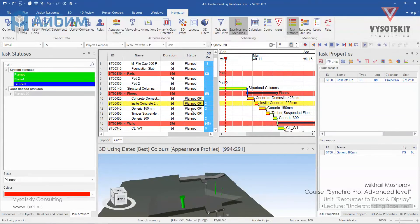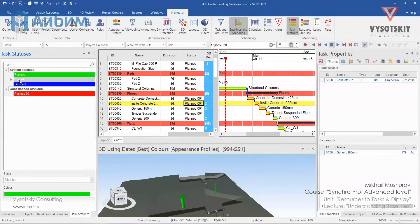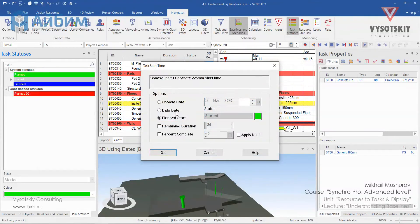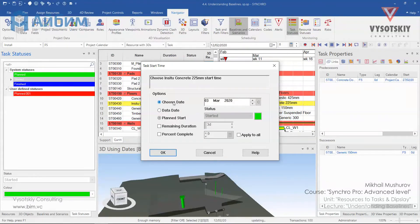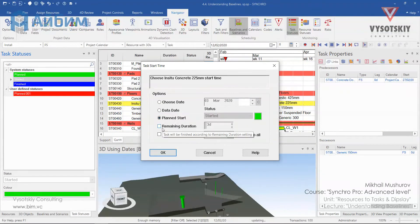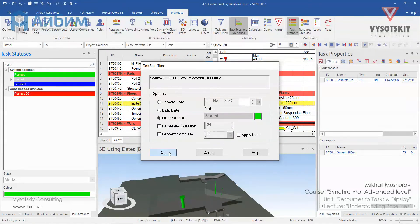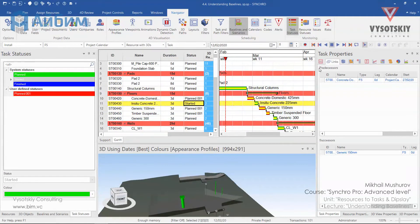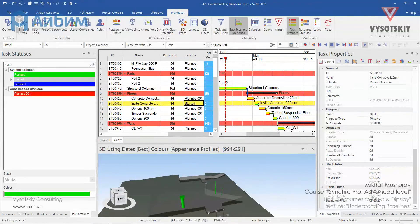Although if you change task status from planned to started or finished, Synchro will ask you to choose actual start date. For example, let's try to assign started to this task. And you see in the dialog Synchro asks us to choose a date manually from the calendar. It can be taken from the project's current date or it can be a planned start. You can also specify either remaining duration or percent complete. Let's click OK and you can see the same status in the general properties field. But this was just a small digression from the main topic.